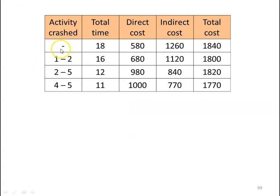Summary table: Without crashing, normal time is 18 days, direct cost ₹580, indirect cost ₹1,260, total cost ₹1,840. Crashing activity 1-2: time 16 days, direct cost ₹680, indirect cost ₹1,120, total ₹1,800. Crashing activity 2-5: time 12 days, direct cost ₹980, indirect cost ₹840, total ₹1,820. Crashing activity 4-5: time 11 days, direct cost ₹1,000, indirect cost ₹770, total ₹1,770. This is how we crash activities in the critical path step by step to find minimum project duration and cost.